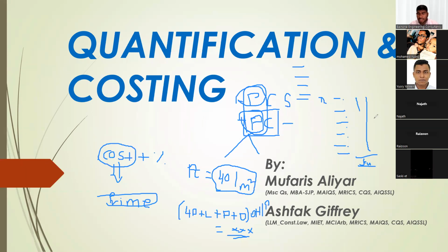material is 40 dirham only at your installation, because the client and the consultant know that the price for the installation is not different for all the contractors. The difference will come only in their overhead and cost. That installation, tools, labors, these all are the same for all the contractors. So that is what they tell the contractors, we give you the material price.